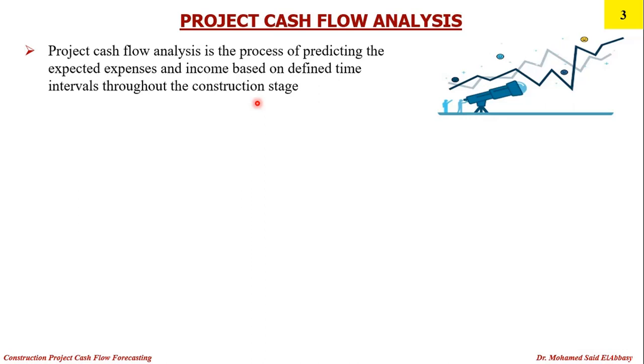So within the start and the finish of the project, there are certain time intervals defined based on the contract. And what I need to do is to know what will be the expected or the forecasted expenses at each time interval, and at the same time, what will be the income at each time interval. This is simply what is project cash flow analysis or project cash flow forecasting.